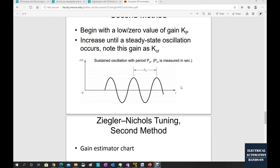Or, if you have to connect the actual process without using the simulated object, you can still gradually increase this K. If your system cannot get this oscillation — meaning the system physically cannot oscillate — you can estimate what the big value of K would be at the moment it would cause steady-state oscillation, and estimate the PCR and KCR. We will use this KCR and PCR to calculate the PID parameters. After all, those PID parameters will be used as initial values, and we will still fine tune them during online testing and long-term commissioning. That's why sometimes the estimated KCR and PCR are still workable.